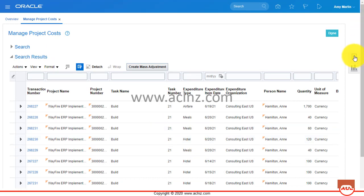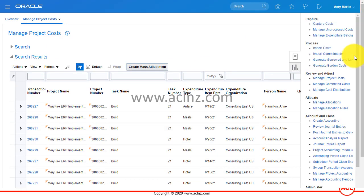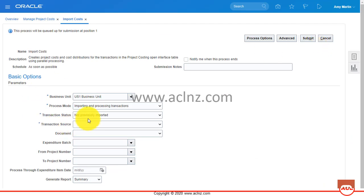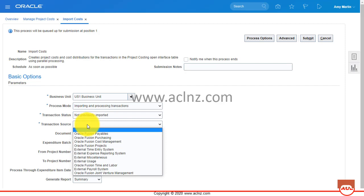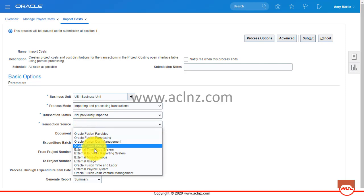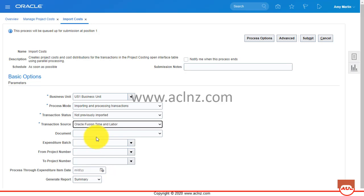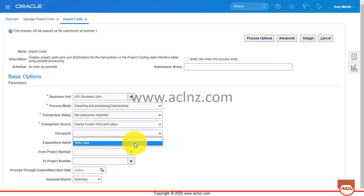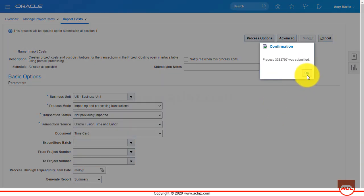To import, you have to go back to the task menu, and under Process you have something called Import Costs. Click on that hyperlink and select the business unit. Set the processing mode to Importing and Processing Transactions, transaction status to Not Previously Imported, transaction source to Oracle Fusion Time and Labor, and the document to Time Card.